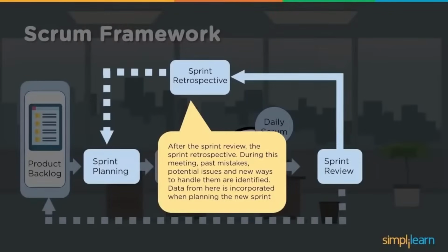So it works like lessons learned: what went well, what did not go well, and what we did about those. What is the learning we have from these iterations, and how can we ensure the same mistakes will not repeat in upcoming iterations? Those can be discussed, documented, and then considered while moving to the next sprint.